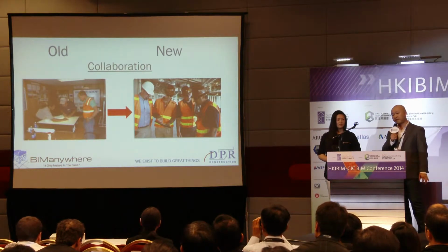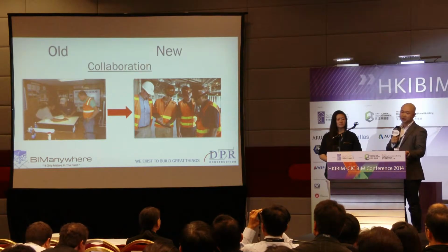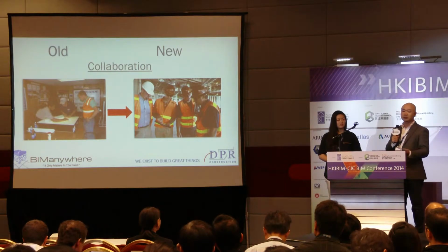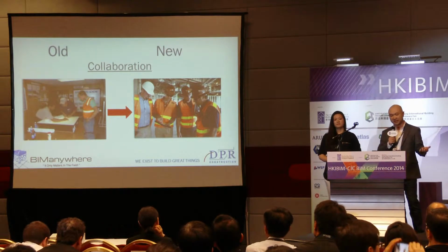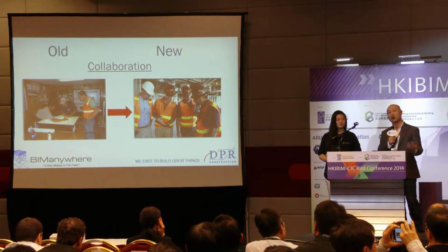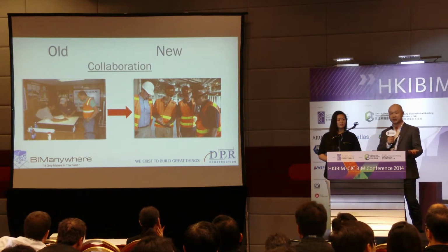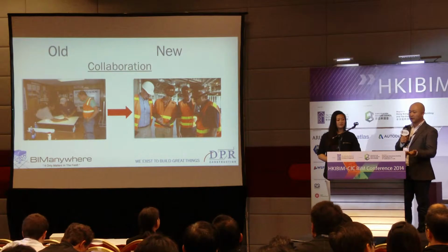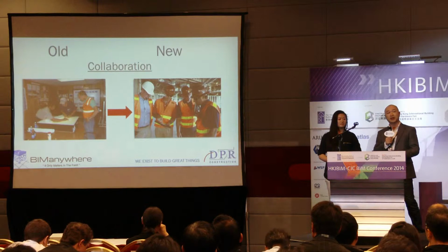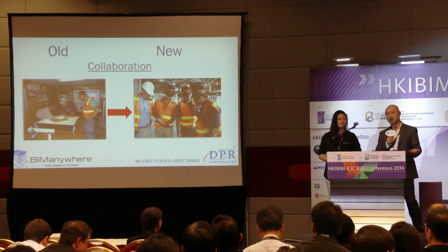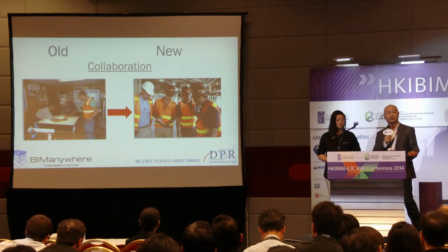You're going to experience new workflows and new processes in the field, for example in collaboration and solving issues. In the old-school way, you would walk back to the office, look at the plans, maybe use a light table, get a meeting set up with all the trade partners, and perhaps go back to the field to look at the same problem areas. In the new way, if you utilize mobile technology, you can solve it right there on the spot. What used to take hours and perhaps days, you can solve by looking at the model on the spot in a few minutes.